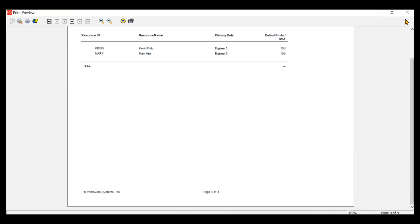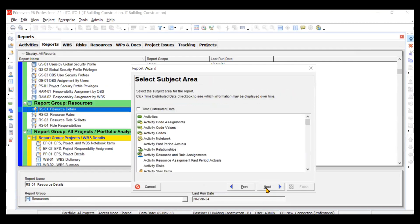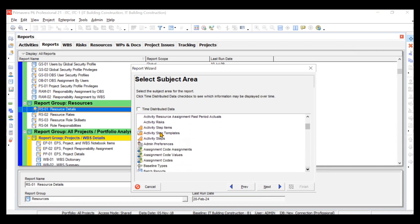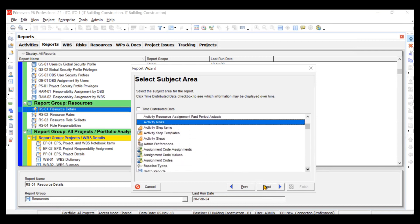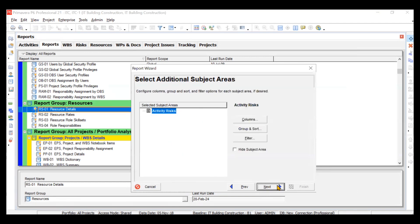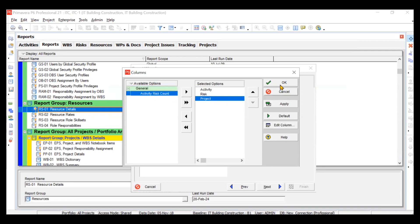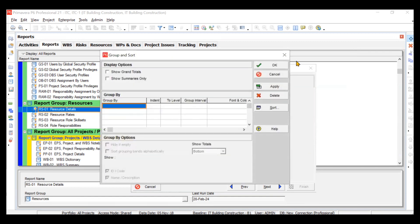If you want to customize your report, go to the commands bar, click the plus option, and go to New Report. Suppose you want Activity Risk to be printed. We'll click Next. For columns, we want Activity, Risk, and Project. You can add Activity Risk Count if you want, but we don't need it, so we'll click OK.